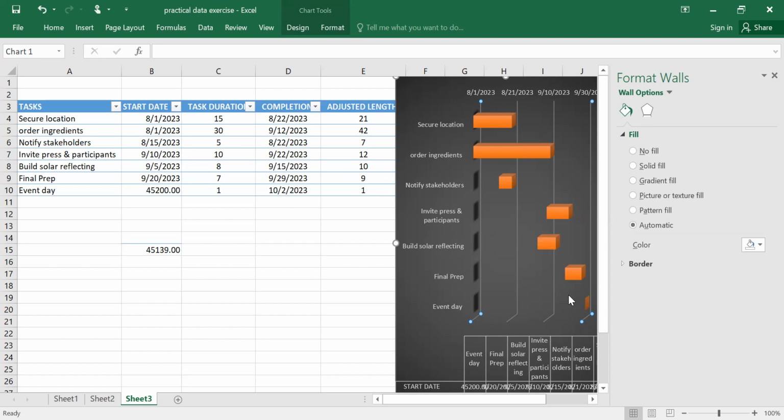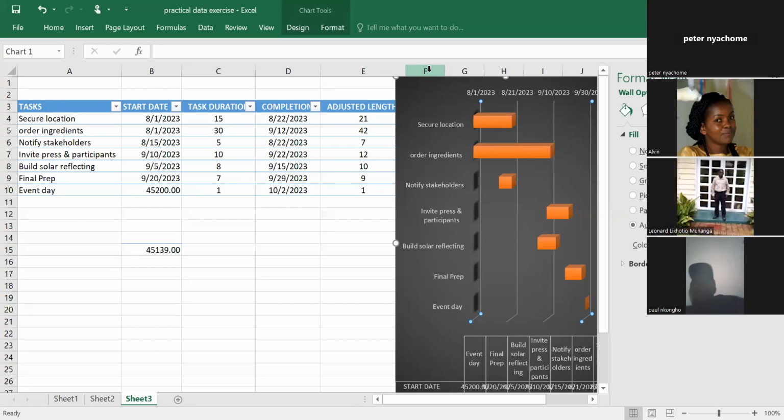Because remember, you need immediate feedback, because you want to factor that feedback in order for you to progress. So each and every stakeholder, you must examine what is the best means of communicating with them, so that you also write down that Mr. X, I will only use phone call. Mr. X responds to emails very fast. Mr. X is ever on their social media platform, so even WhatsApp, I can use WhatsApp. So you treat your stakeholders on individual basis, because they have their unique preferences, and those preferences must be factored into our project. We need their buy-in as we continue implementing the project.